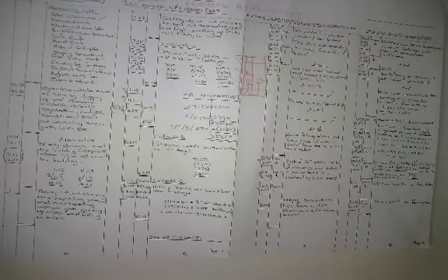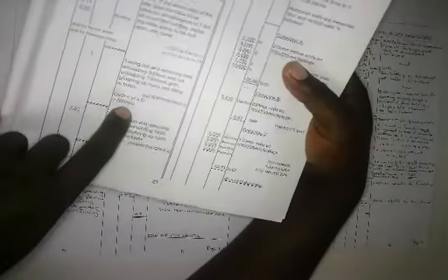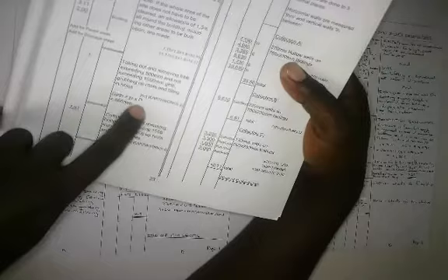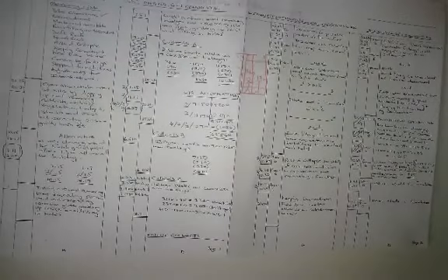Now you might want to ask, how do you calculate the girth of a tree? Maybe it's worth me sharing with you guys how you would go about that. The formula for calculating the girth of a tree, there it is. The formula is girth is equal to pi times diameter. So you must look at the drawing and see what is the diameter of your tree.